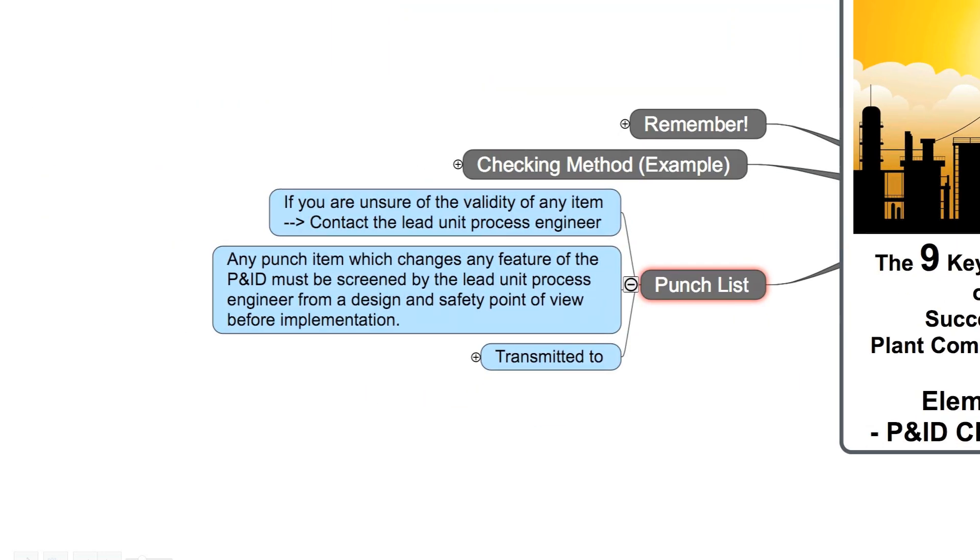When you perform the P&ID check, you will for sure find one or more deviations from the P&ID or other specifications. In such cases, you have to put this deviation into a punch list. If you are unsure of the validity of any item, please contact the lead unit process engineer to discuss it. Here is one important advice: any punch item which changes any feature of the P&ID must be screened by the lead unit process engineer from a design and safety point of view before implementation.